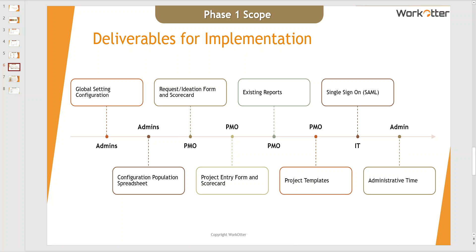Last but not least, for clients using the timesheet, we want to set up what we call administrative time projects. These are things like PTO, sick time, and other things that aren't necessarily real projects — they don't have a start and end date — but you want to be able to collect, track, and manage this administrative time. This can also include having a vacation calendar.